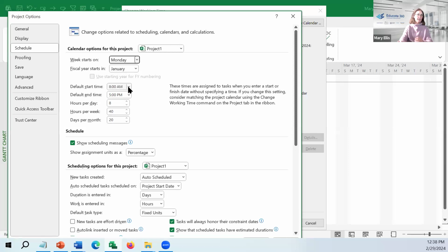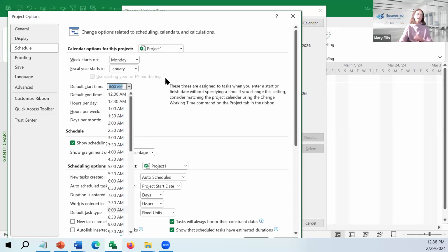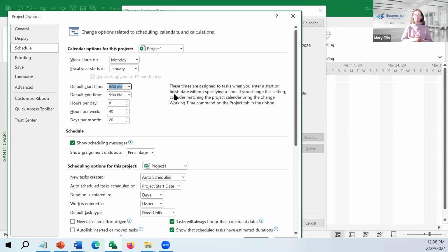If your day doesn't start at 8, but 9, take a moment and go, wait a minute. The majority of my staff, my colleagues, peers, what do we say is their start day? Here, Educate 360, United Training, 8 to 5, that is perfect. If I'm working with a hospital in the Boston area, then I would change this to say 7:30, and I would end it at 4:30. So that way Microsoft knows what is the definition of a workday.